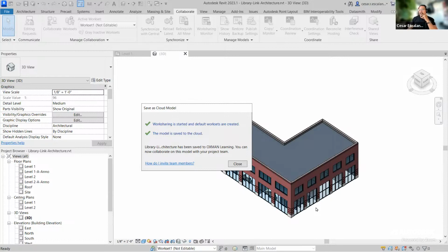Or if you are creating a big multi-level building and you're grouping work sets every 5 floors, maybe everything on floors 1 to 5 is part of work set 1. It's a way to break down the model into reasonable, loadable, and unloadable sectors